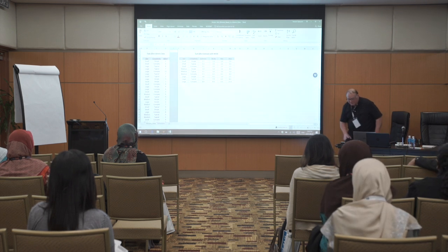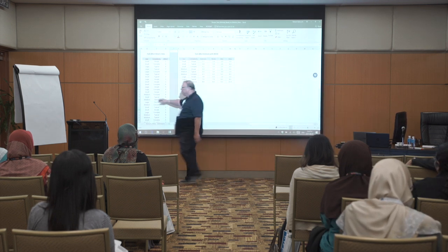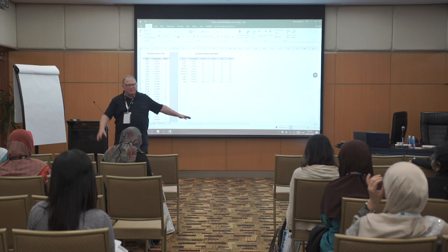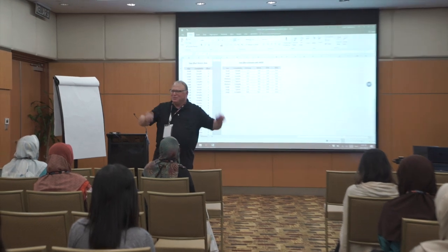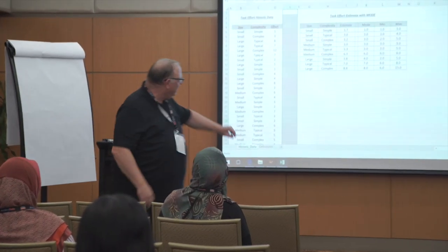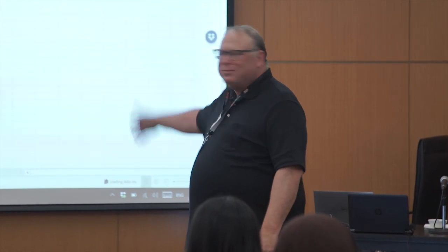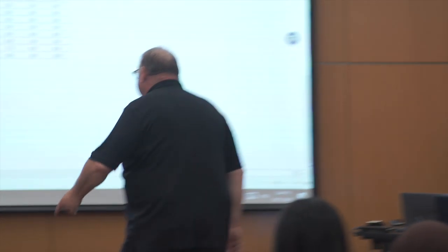Whenever you want this spreadsheet, the electronic copy, send me an email and get the link to it. This is the magic spreadsheet here. Very simple. When you finish a task, you collect the size, complexity, and effort in whatever units you like. If it's effort in hours, collect hours. I collect sessions. You just collect, you don't even collect the name of it. You don't need to know the name of it, just what was the size? Was it small, medium, large? What was the complexity and what was the actual effort?